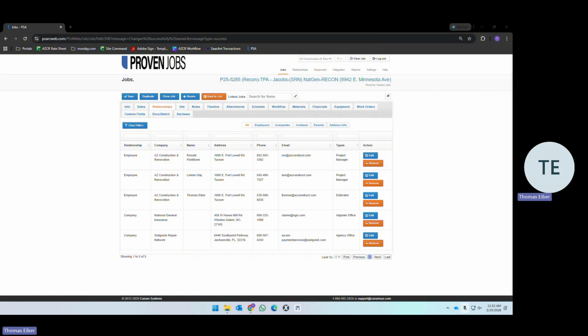Final photos is another deliverable from you. And lastly, we are asking you to deliver the PCN date to your operations manager. So final photos, obviously you upload whatever documentation is required, and then you provide that PCN date. Operations puts it in the system, and AR and AP are informed to invoice and expense appropriately.